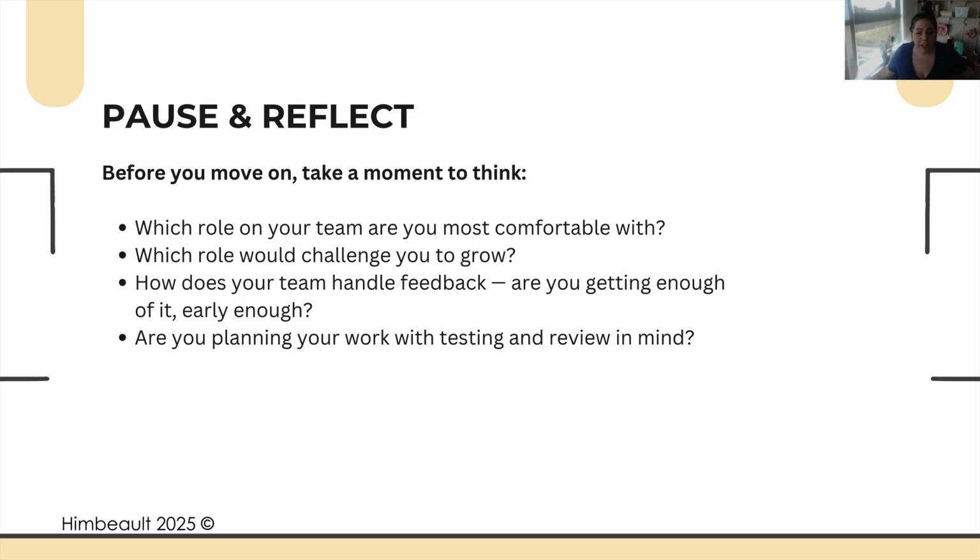And lastly, are you planning your work with testing and review in mind? Most likely, many of you are not yet including those, and like I said, double it. Whatever time you're estimating to work on an item, if you're saying, I think it'll take me about 4 hours to complete this feature, double it. Take that and add 4 more hours for planning out your work, writing your tests, doing the code reviews, making the code review changes from your teammates.